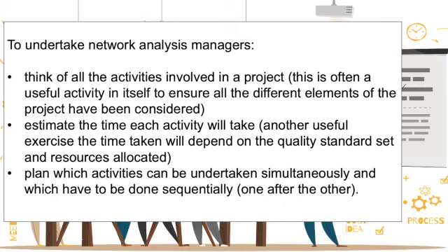So to undertake network analysis, managers must think of all the activities involved in the project, which is a useful activity in itself because it ensures that all the different elements of the project have been considered. They estimate the time each activity will take, and they plan which activities can be undertaken simultaneously or which have to be done in sequence.